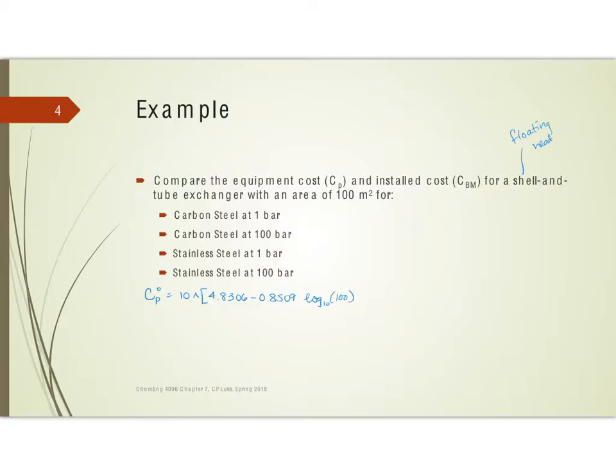And you'll need to look this up to make sure that you understand how to do this. That's the formula. You just get that from the book. We've plugged in the size of 100 square meters. And if you look at this in the calculator, you get $25,327.95.